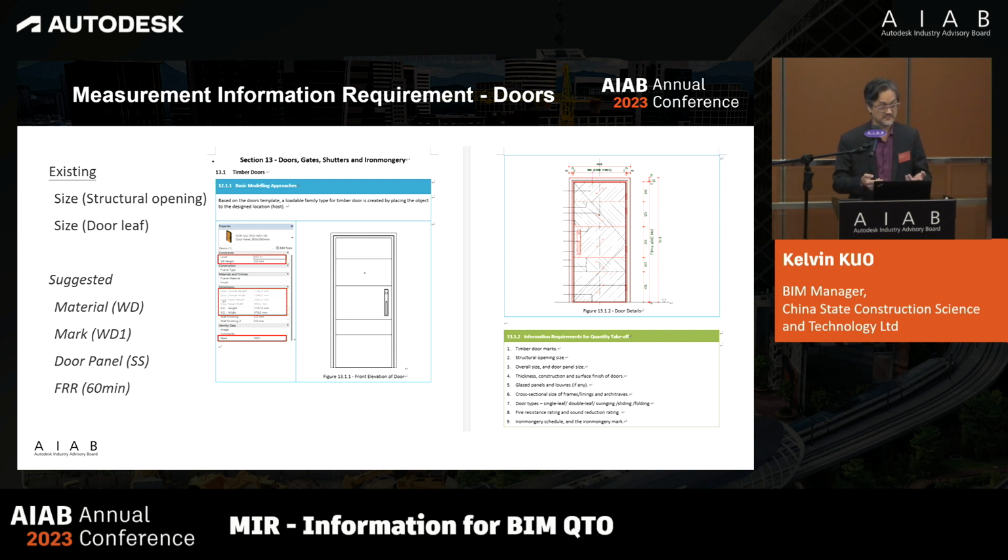So was it a metal door, a wooden door, or a glass door? Okay, it all depends, since the weights affect the pricing. That's why we need to quantify and classify, and as I mentioned, we need to know more. For example, the fire-rated ratio: is it a one-hour fire rating or a half-hour fire rating?